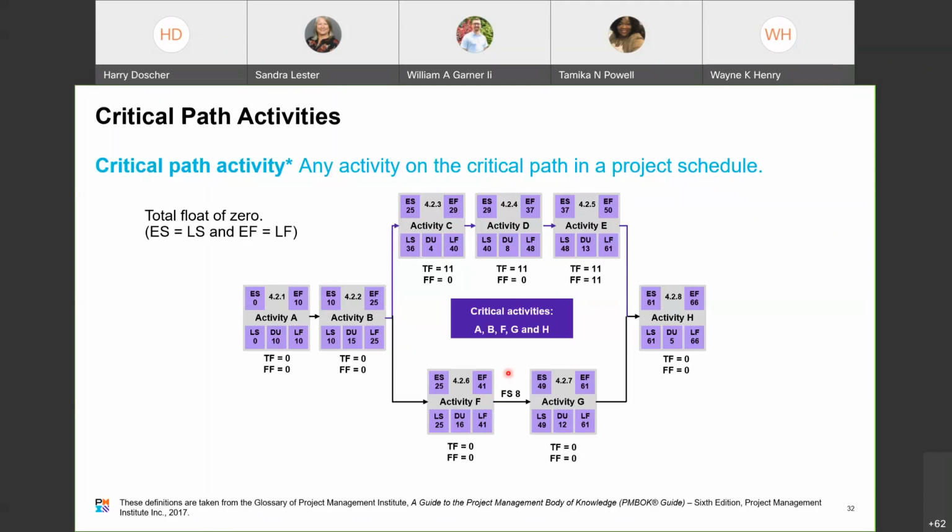Yeah, it just is a function of the network diagram here, because these three activities have to be done in sequence. They don't depend on activities F or G. Now, what we're taking a look at is, F has to be completed before activity G starts, okay? So you've got a total duration here, which is 4 plus 8, 12, so 25 here. Total duration is 25 units of time.